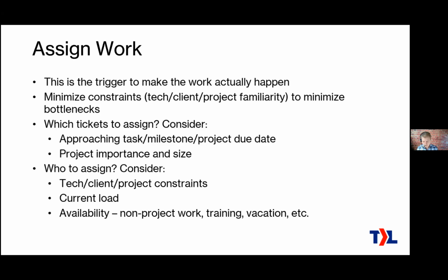We also need to consider, like I said, that senior engineers need to do senior work and no other work. Maybe you only have certain engineers working on certain projects, so you need to consider that when you're assigning, along with the current load of the engineers. And that totally has to do with the bottlenecks. Maybe you've got two or three senior engineers, but among them, one is busy. Okay, so don't assign that person more work, if you have the choice. Also consider their availability, because maybe some are doing non-project work, or maybe they're off on vacation or whatever. So consider all those things when you assign it.